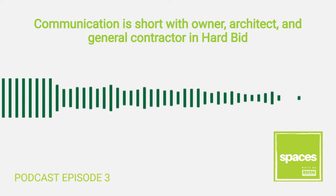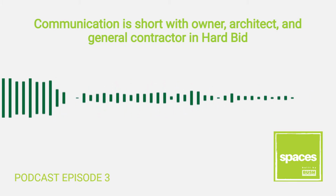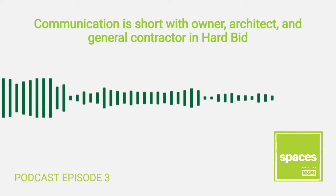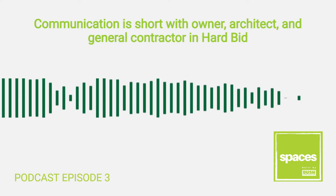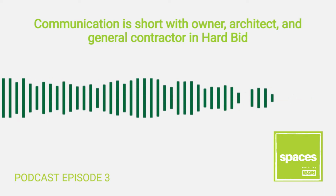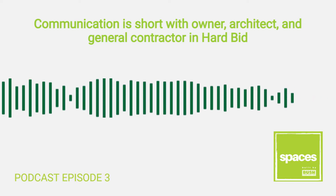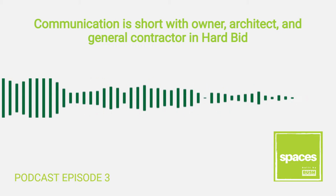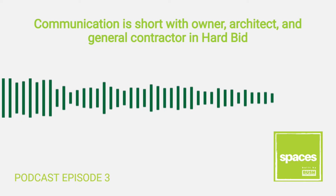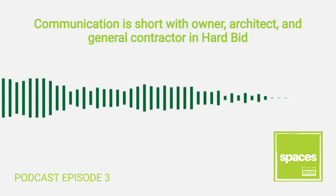And when you talk about the time frame for collaboration between design, bid, build, hard bid, and kind of the other delivery methods, if you think about it, you have your design team, your architects and engineers for, call it 6 months to design a large project. At the end of that 6 months, there's 2 or 3 weeks to get, like you said, contractor input, right? Well, there's value in both of those. So when you start to talk about the other delivery methods, that 6 months runs in parallel, where instead it's 6 months of one line, stop that line, go 2 to 3 weeks of a contractor asking as many questions as possible to things that they're finding within the bid documents, and then you go right to build. So there's a very, like I said, very short, rapid fire time frame to kind of figure things out.